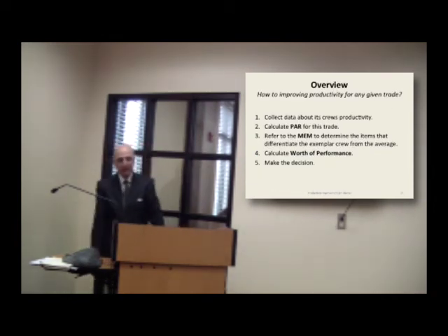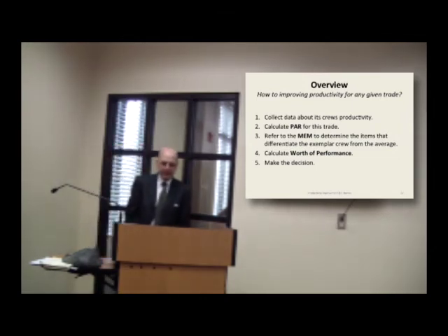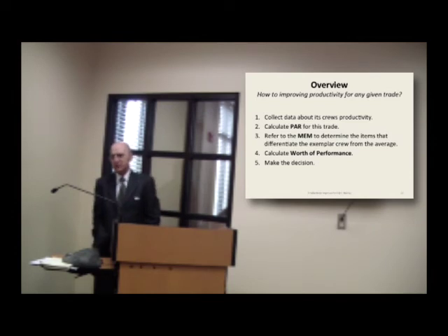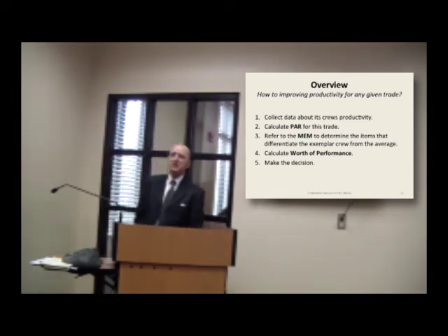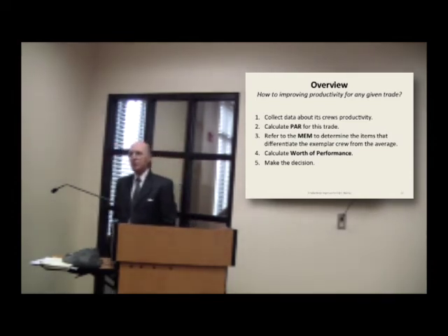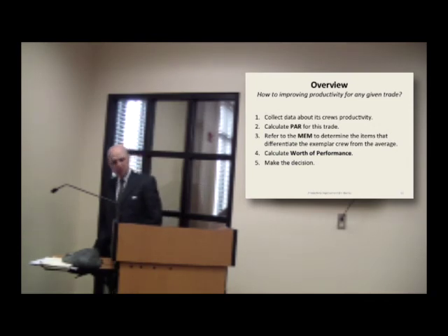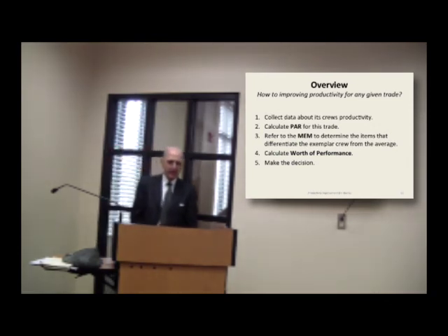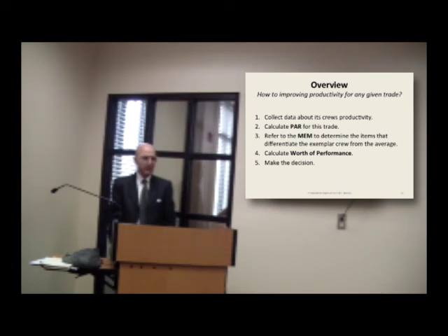Overview. How to improve productivity on any given trade. If you have a trade, a carpenter or something, and you are the project manager, you are not here just to expedite and get the workers to conform to the average. If you can improve productivity, that's your main job. How to do it? First, collect data about crew productivity. Draw the curve, something like that. Look for the exemplar.